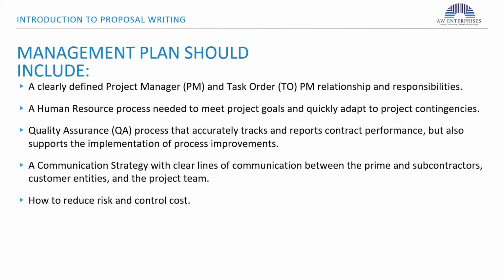The issue is that the contractor is taking on this kind of risk: I am charging you X amount of dollars to do this particular contract, and I can't come back to you and ask you to change it because I left out a cost item, or I didn't consider a certain function and how much that would cost. Unless it is changed by the government, a firm fixed price can't be changed.